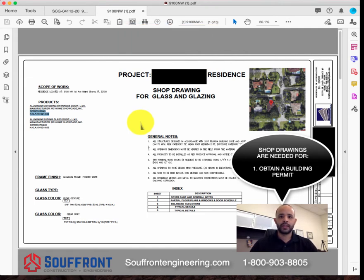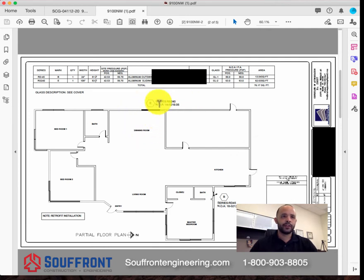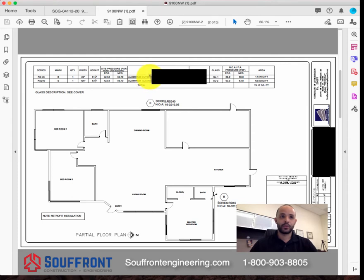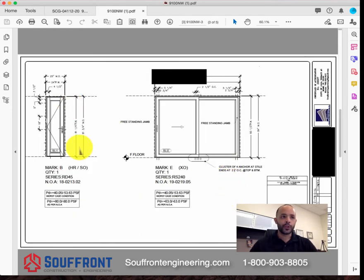Shop drawings are needed in order to obtain a building permit to install windows and doors. Here we have a general floor plan — we highlight the areas of interest that we're going to be working on, with notations showing the series and a schedule table showing the systems we're going to be installing. In this case there's an outswing door and a sliding glass door — marked here: E is a sliding glass door, B is an outswing door. We show the building examiners and inspectors an elevation view of the product and how it's going to be installed.